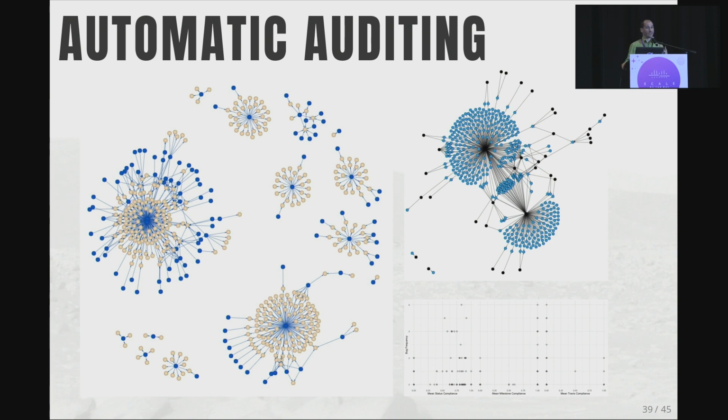So you probably have seen a lot of abandonware in your life, software projects that kind of die because, you know, the developer has something else, something happens in their life, they get a job and they have to quit the project. And what these tools tell us is, for example, that there are certain people that are responsible for some modules and no one else knows how they work. Or that there's a couple of people taking on most of the issues and no one else is doing as much. And that's a risk for you.